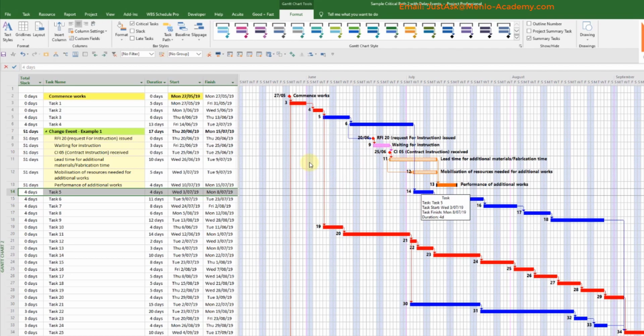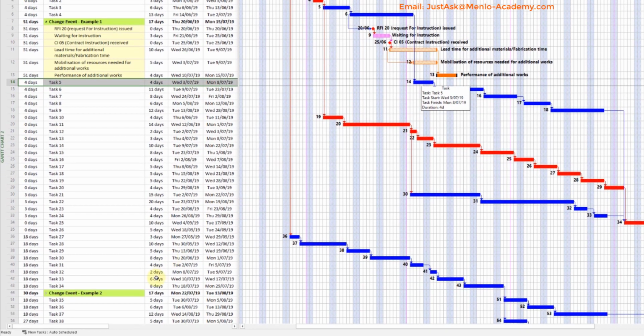The other example would be, say, where you've got the same soft spot, but this time you're in the middle of cutting foundations, and the foundation work would have to stop until you fix the soft spot before the foundation works could carry on. So it literally would split the tasks, and we'll look at that in this example here, just to show how the two impact things.